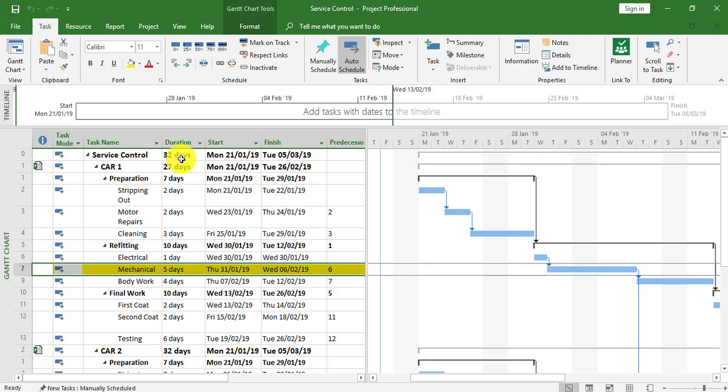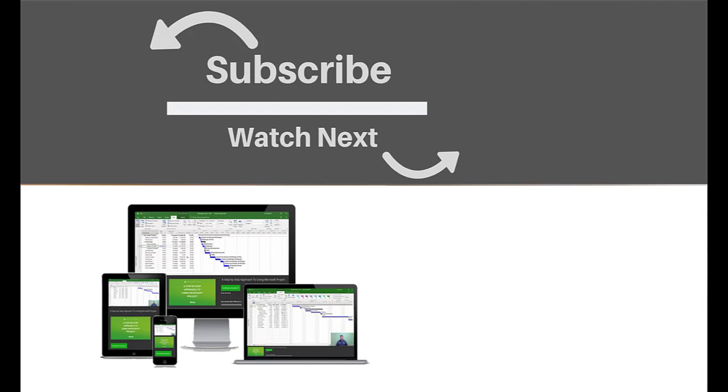The duration has increased as expected to 32 days — the extra five days because one finishes after the other. This completes linking tasks between sub-projects within a master project, and demonstrates how when the master project is closed and a link is changed in the sub-projects, it affects the master project itself. This gives you an idea of how links work in Microsoft Project between master and sub-projects. If you enjoyed this video, make sure you like and subscribe to our channel — hope to see you for the next tutorial, thanks for watching.